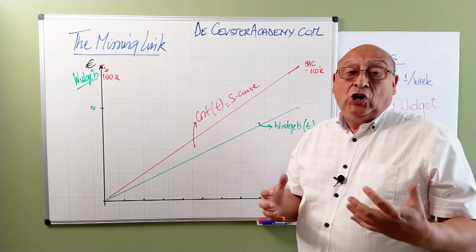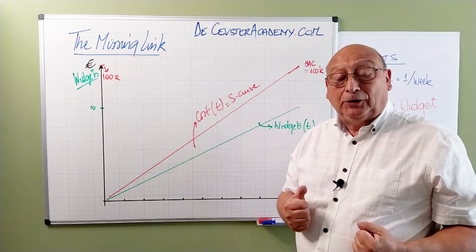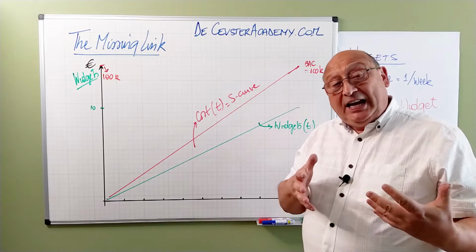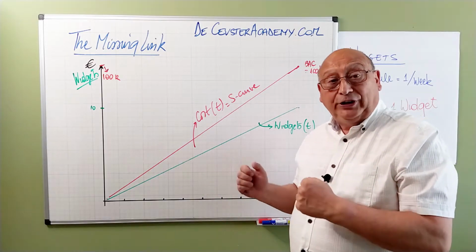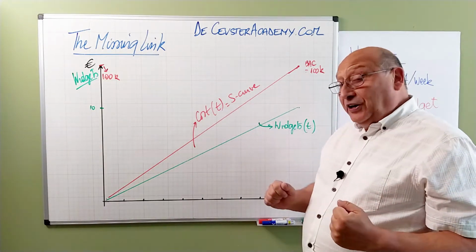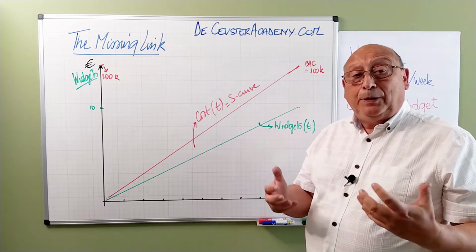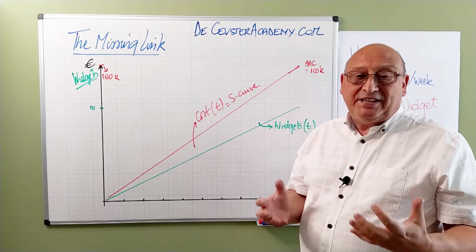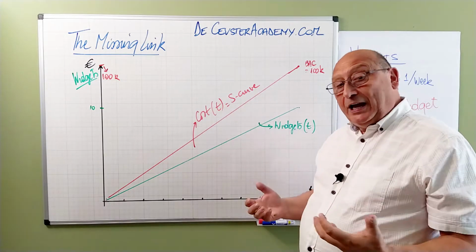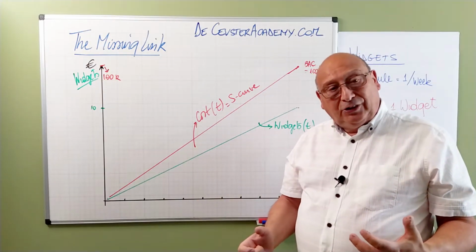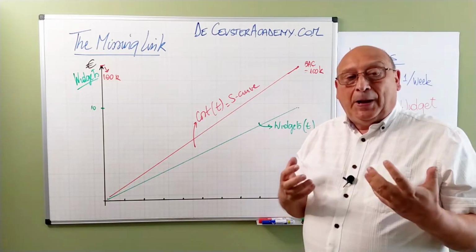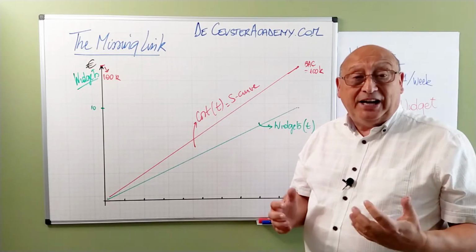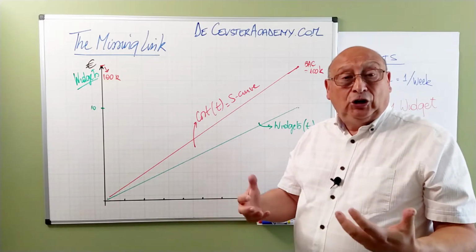And the S-curve there contains basically two sets of information. First of all, it's an indication of the schedule baseline, because it's based on the timing that we are planning to create those widgets. The other information is the cost information. How much do we plan to spend to create those widgets? This is basically the missing link, which we didn't look at before, because we only looked at cost when we looked at the S-curve, but the S-curve basically contains more information. It also contains the schedule information, how we are planning to create those widgets.